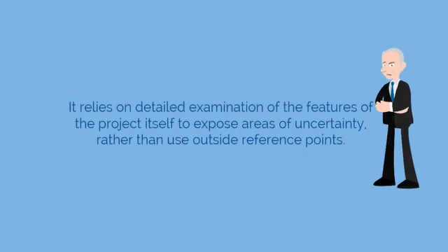Next is current assessments. This is different from historical review in that it relies on detailed examinations of the features of the project itself to expose areas of uncertainty, rather than use outside reference points.